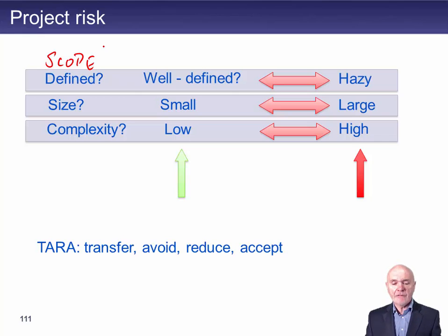And the chances are that if you just say we're going to improve inventory, people will have their own spins on it, and some are going to be disappointed at the end of this, and there's going to be a lot of unrest probably and disappointment. If, however, it's well defined, you say what we mean by improving inventory is to reduce the number of stockouts, the number of times we don't have inventory when a customer wants it.